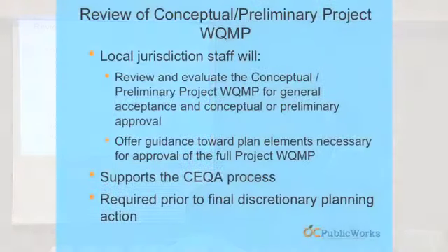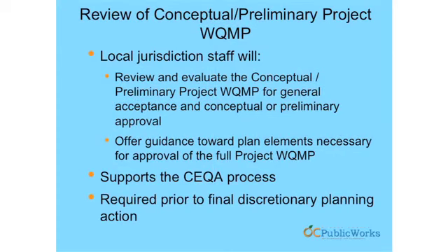So this is going to be your first opportunity to review. This is also going to be your opportunity to offer guidance towards what they're going to need to do, either in terms of changing the commitments that they're talking about making. So there could be an opportunity here for you to say, that commitment that you're making to use treatment control BMPs for this area doesn't fly. You need to do LID BMPs everywhere. You need to commit to evaluating feasibility and do that.